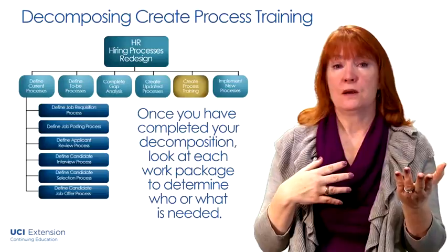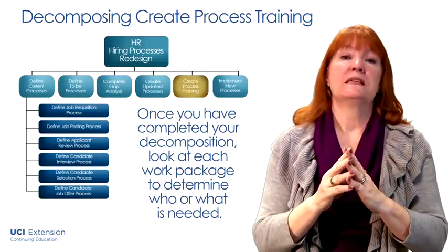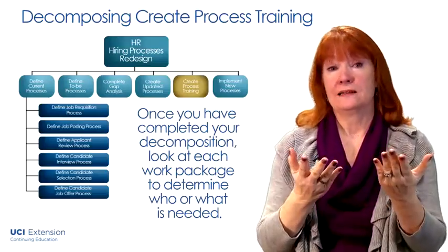Once you have completed your decomposition, you can look at each work package and determine who or what is needed to make that work a reality. Remember, this is not something you need to do by yourself. Enlist the help of your team, and certainly those who have the expertise in each area. In our example, we need representation from the training department, and if it is online training, quite possibly representation from the information technology team.